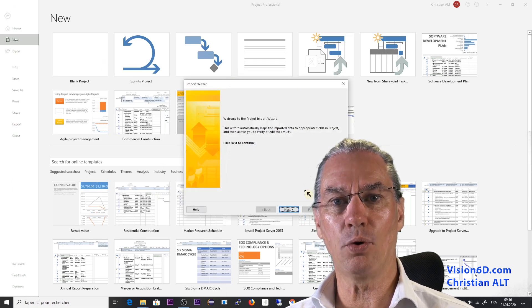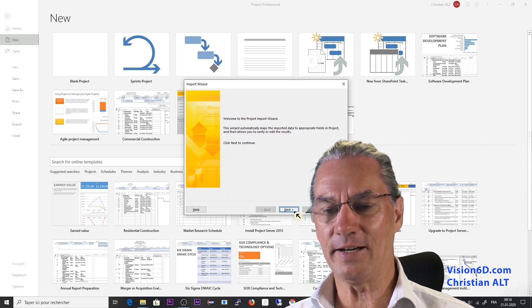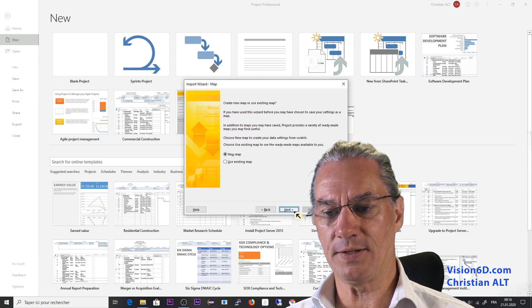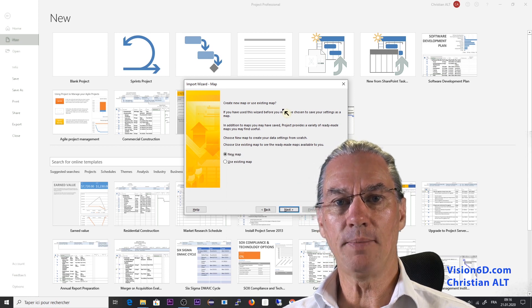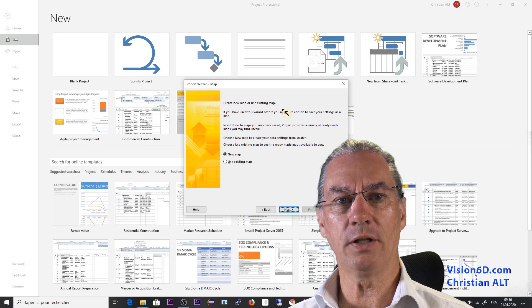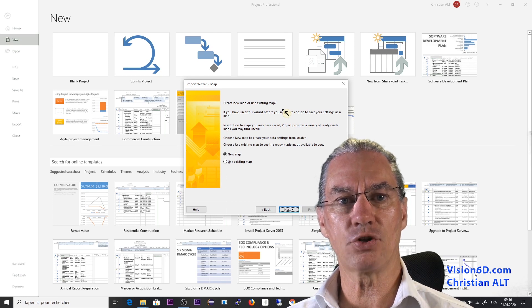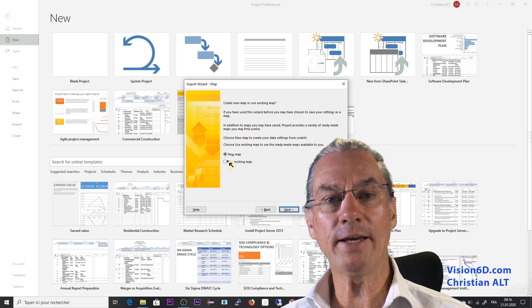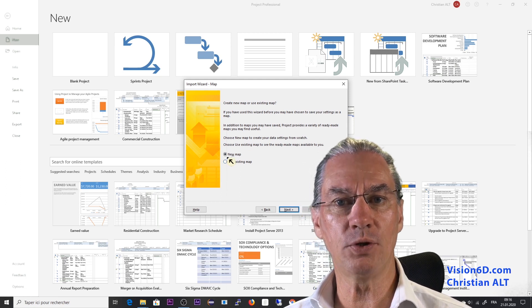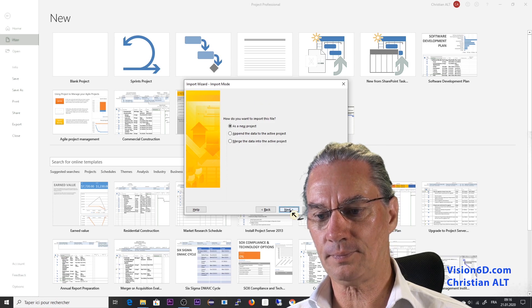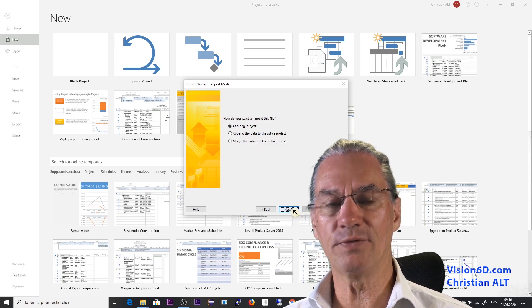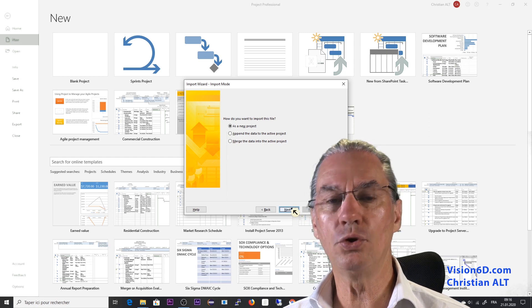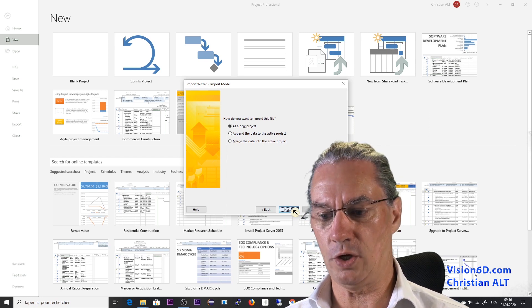It's opening the import wizard and there I'm going simply to say next. Here the map. The map is how to have the fields from Excel match fields in project. So I could have an existing map but here I'm using a new map. And I will create a new project out of this or as you see you could append this to an existing one.